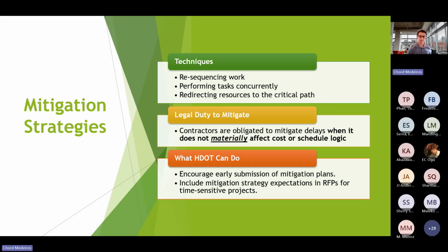Not for the contractor specs. Yep. So material different refers to a difference that is substantial compared to what was reasonably expected or represented in the contract document. So yes, Charmaine. In differing site conditions, conditions are materially different if they are beyond what the contractor could have anticipated based on the contracts, plans, specs, or the typical industry conditions or typical conditions of the site, right? So that is materially different.